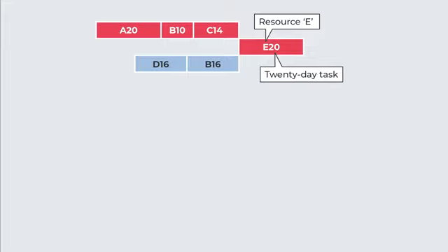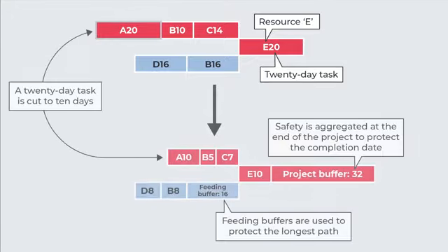The first thing that Goldratt suggests is to look at the duration of the activities. If those reported are the maximum possible durations of activities, as in this case, Goldratt suggests to reduce them to point B, so to around 50% probability of completing the activities in time. How can this be done?